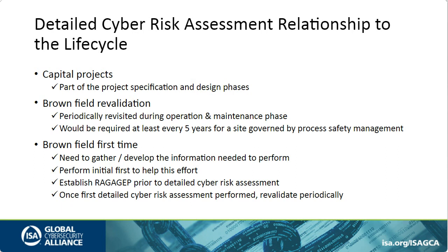So let's talk about the relationship of the cyber risk assessment to the overall life cycle of an operating facility. If you think of a greenfield site, you're going to go through a capital project, and as part of the project specification and design phases, doing your risk assessment is a staple. Ultimately, that capital project will go into operation and exist for many, many years.